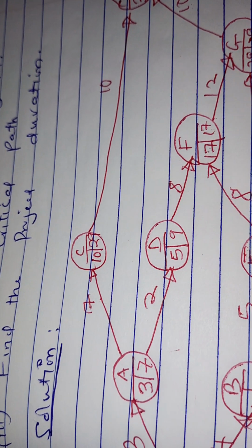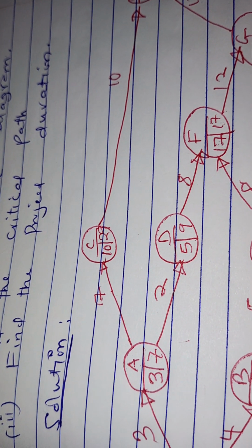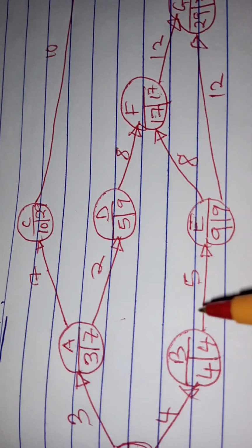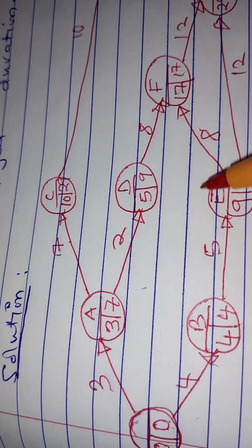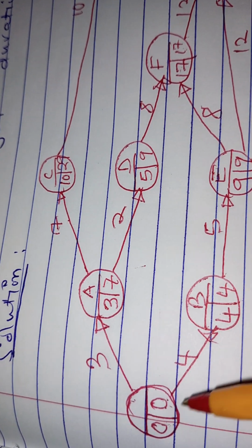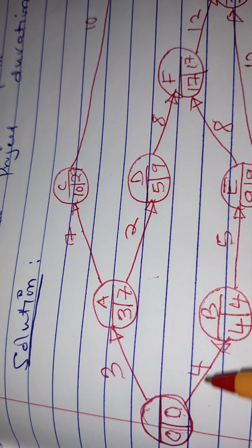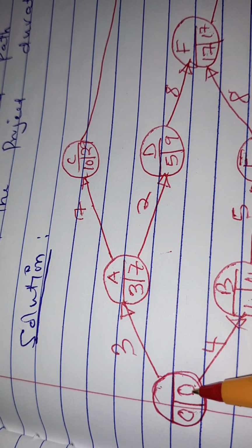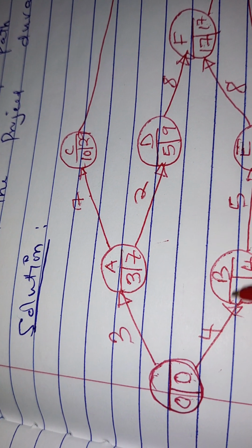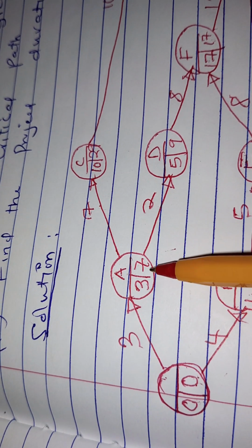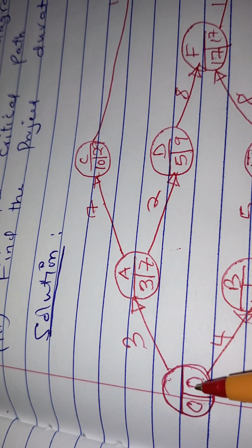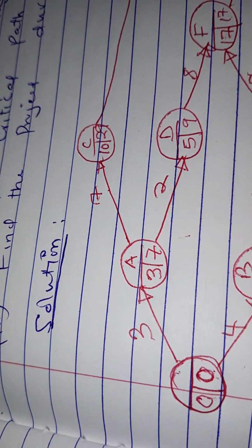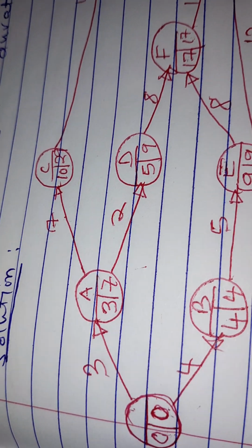And then 9 minus 5 is 4. And we said when we are coming back in the backward pass, we shall be picking the smaller number. Again, we are having a junction here. We have 7 minus 3 giving us 4, or 4 minus 4 giving us 0. And because we have to pick the smaller number, it's either 4 or 0, and we pick 0 because 0 is smaller than 4.